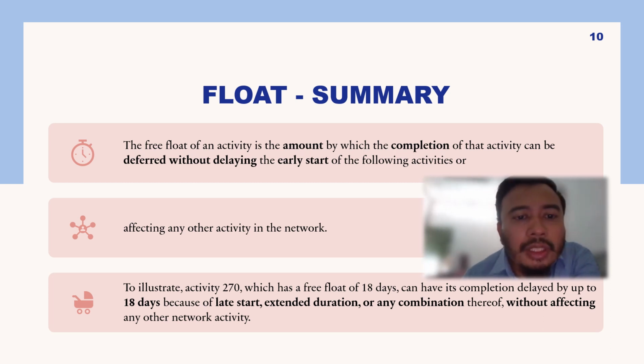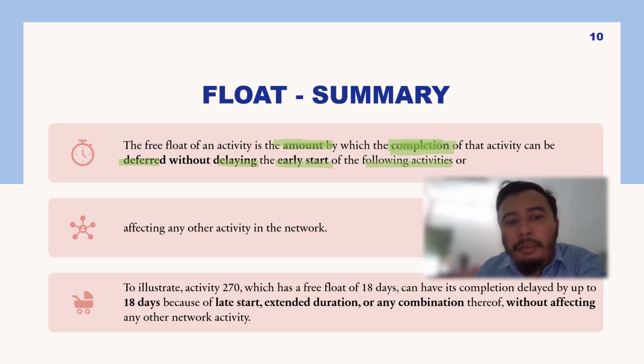The free float of an activity is the amount by which the completion of the activity can be deferred. You can delay the work without delaying the early start of the following activities. So that is free float.